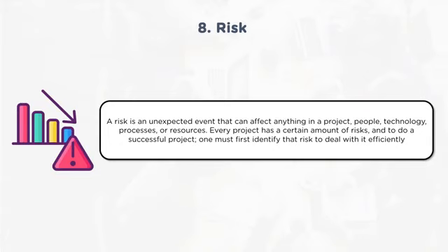If it is a negative risk, definitely you should have a mitigation or avoidance or acceptance, whatever the mitigation plan you have, to eliminate the negative impact of the risk when it occurs. If it is a positive risk, it's quite obvious one has to take advantage of that. One has to enhance, exploit, or share a positive risk so that the organization is benefited.